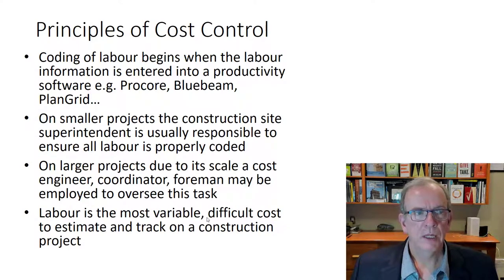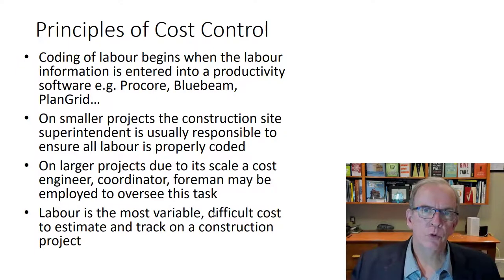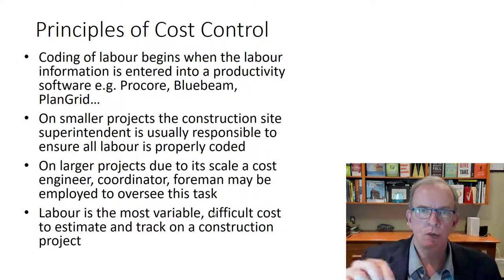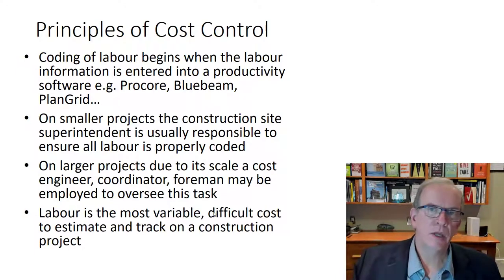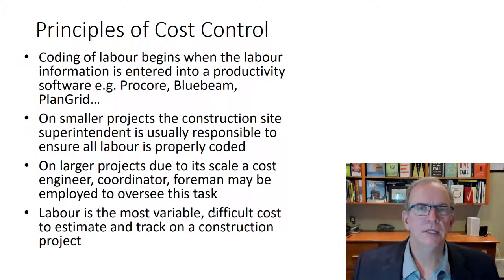All right, but really, coding does have to begin with the labor information. If we're talking about monitoring labor, if you have your own forces, you're going to want to have some sort of methodology of tracking their time. Every time somebody works on your site, one of your employees, how many hours were they working, and on what particular area of work? So they worked 8-hour days, is it? And so then what were they working on? Is there a cost code that you can assign to that work?